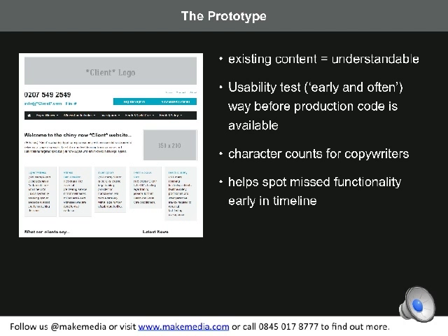What was great about this is that, one, you can usability test the prototype. It's got the content in place for you to do this, and you can quite easily and early check what's incorrect about all those design decisions that you made. And we spent a lot of time reviewing this with the client as well once we'd usability tested it, and we spotted quite early on that the client had missed out a couple of key aspects in their briefing process. So, 10%, 20% into the timeline of the project, we're already starting to see stuff that we've missed out. And it's a lot better to find that stuff out that early on than it is to find it